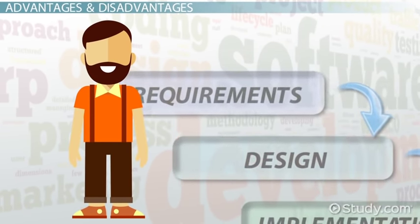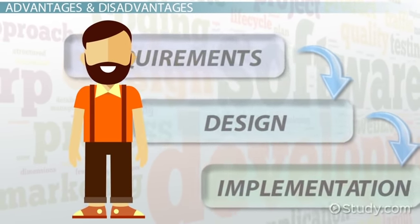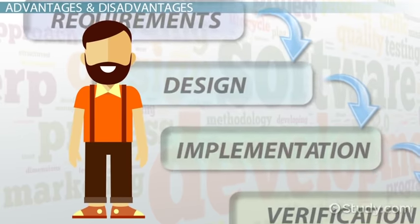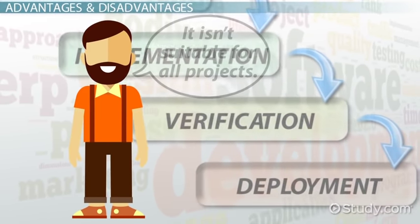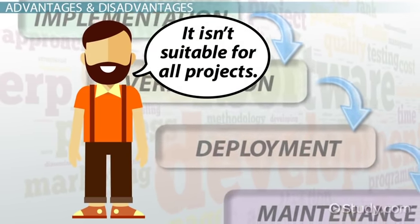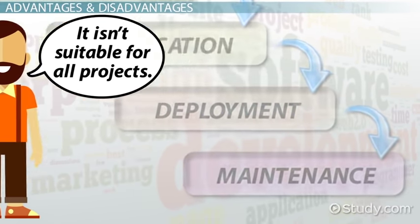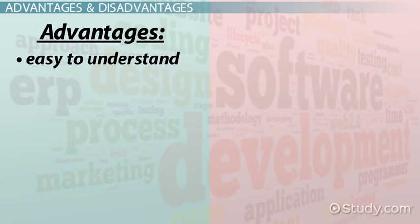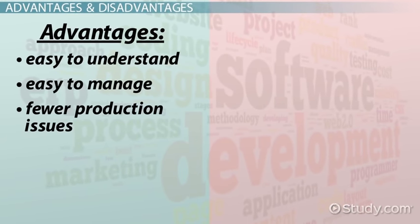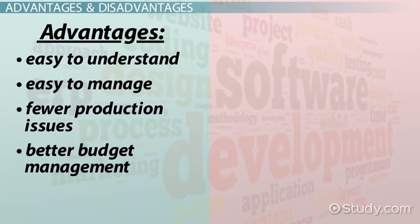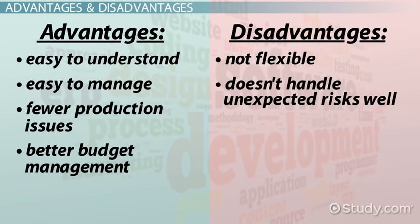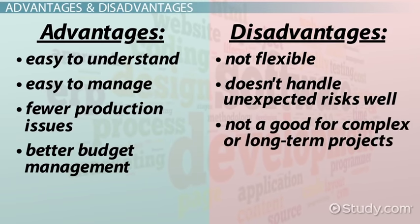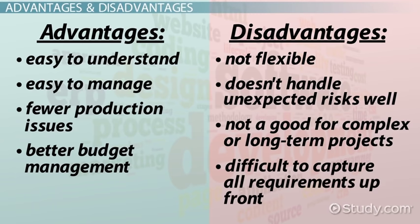As our new project manager doing a simple software development project discovered, the waterfall model has clear advantages. However, it does have disadvantages, and it is not suitable for all projects. The waterfall model is easy to understand, easy to manage, has fewer production issues, and offers better budget management. However, it's not flexible and doesn't handle unexpected risks well. It's also not a good model for complex or long-term projects, and it can be difficult to capture all requirements up front.